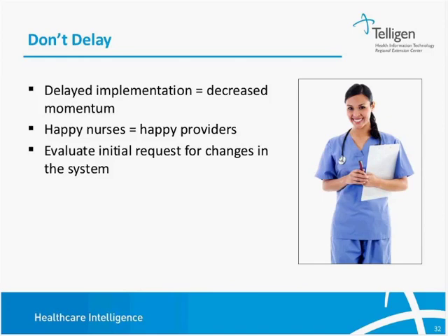And also, the delays increase the risk of staff forgetting the training and education they've received. So ideally, implementation happens within 2 weeks of training, but at a maximum it should be a month, and at a month you're really losing a lot of your information. So make sure that training happens just prior to implementation.